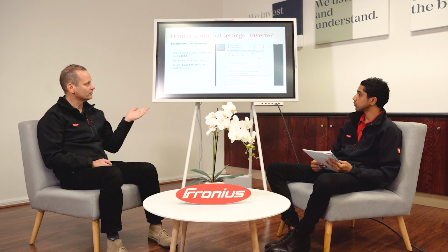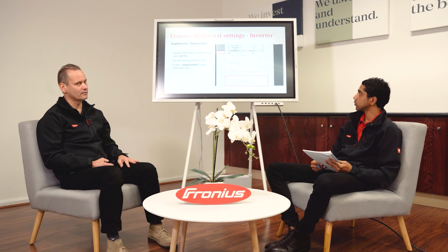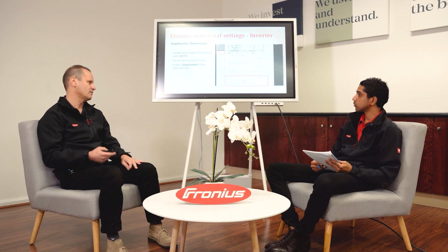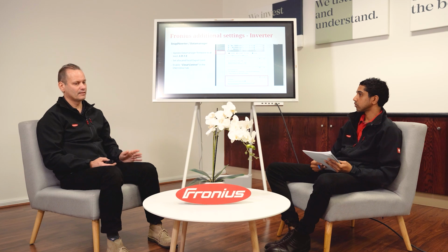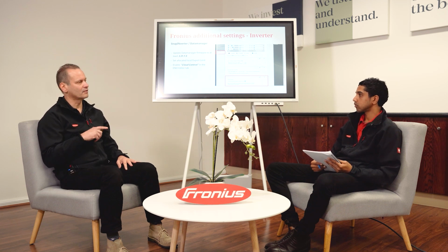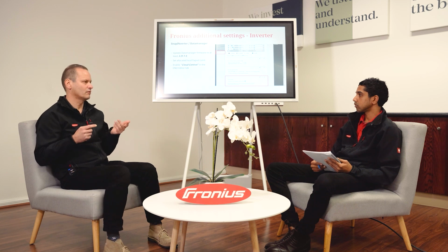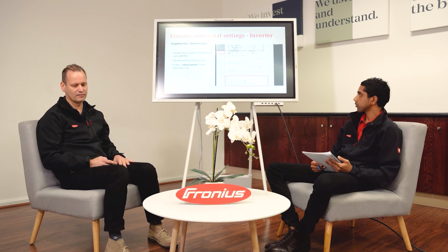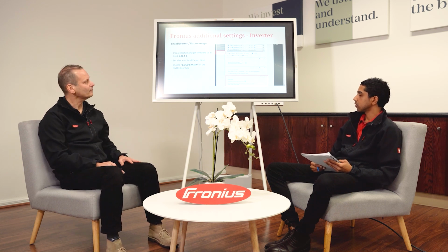If that's forgotten, we do have methods, through a secure channel, of updating that remotely, should it need to be done. However, it should be part of the commissioning process when the installer does it. Otherwise, at the time of doing the capability test, it won't work because it won't be registered. It won't accept the commands.